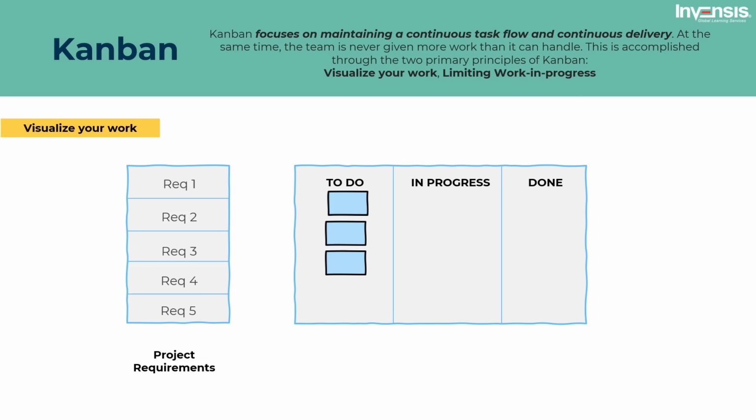Each task is recorded on a Kanban card. As each card is addressed, it moves to the next phase until it's moved completely through the workflow. This is how the entire team sees the status of the work being done. Understanding and observing the current flow of work will help you visualize how tasks are progressing through the workflow.